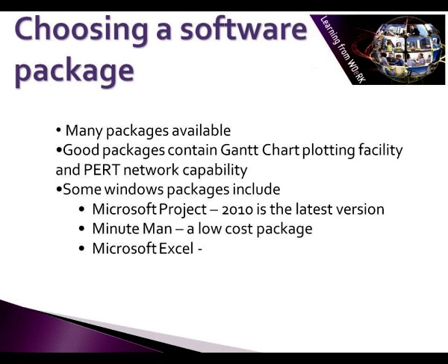The package can usually draw Gantt charts but also draw sophisticated dependencies between tasks in order to identify critical parts of your work breakdown structure and present it in the form of a network diagram. For example, to build a wall you must first order the bricks, and then the bricks must be delivered. These three tasks, order, deliver, build, must proceed in the correct sequence.